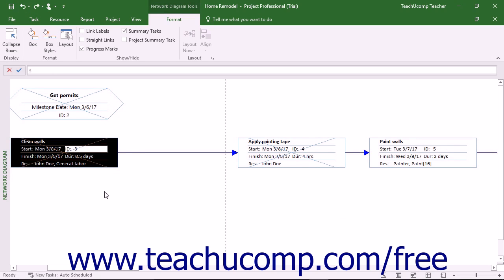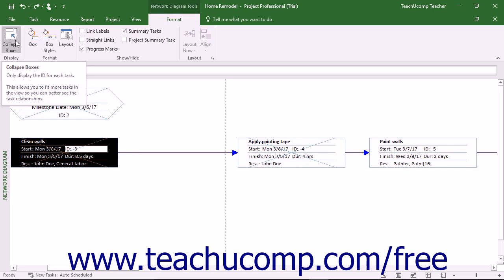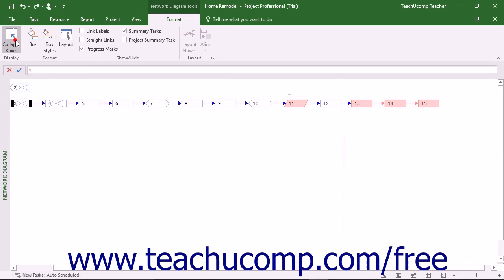As you complete the tasks in your project file, you can see a single strike line appear on tasks when work has commenced. A double strike line appears over task shapes when the task is completed. You can click the Collapse Boxes button in the Display button group on the Format tab of the Network Diagram Tools contextual tab in the ribbon to collapse the display of the task shapes down to a single line that displays their outline number.